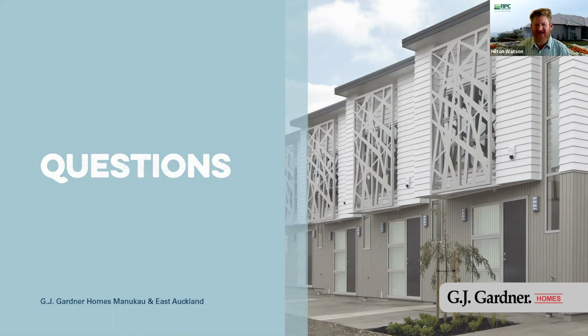It's definitely a case-by-case basis, but, rule of thumb, we're finding on average, if you're subdividing a property for one lot on the back, 180, 200 grand, that will get you everything up to a new title. 3 to 4 lot developments, allow 225, 250, but every site is different, and it's all relative to what's there and what you have to do to make it serviceable.